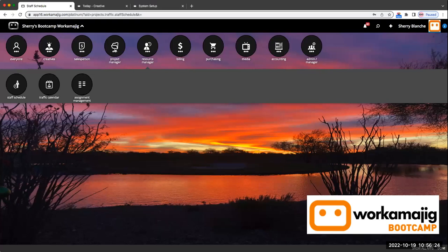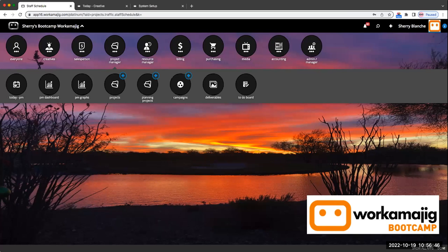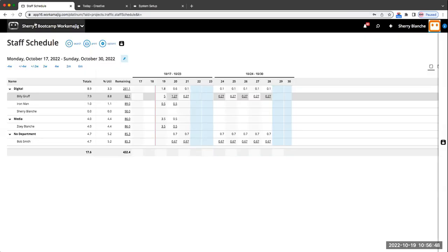Yeah, that's a really interesting question though about allocating just to the deliverable. We really don't do that. The deliverable can still be assigned to a specific task, and that's still going to hold the resource. So there are some that do actual schedules that say round 1, round 2, and actually track a lot of that by task. And those, again, the time itself will be in that schedule.